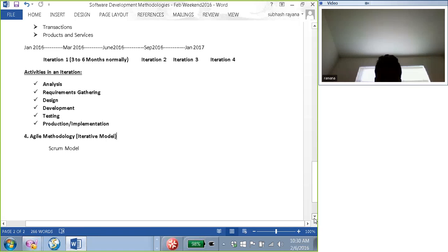And we used to ask for the status. Every team lead will step up in the meeting and talk about what we did. I think we are doing well. These are the activities that we want to do next week, and I think we should be in good shape. And if there's a project in red, then whatever needs to be done, everybody jumps in and makes sure those pending items are resolved. For instance, the technology team is waiting for budget approval. Without budget approval, they cannot hire resources.